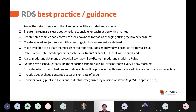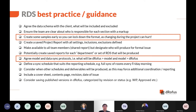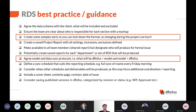We have collected a list of best practices for working on Room Data Sheets. We could spend 15 minutes on these slides, but we will send them in an email to everyone instead. We have three key takeaways: first, lock down the Room Data Sheet format early on in the project phase. Second, establish synchronization protocols and define the data flow between the geometric model and the database. Third, set out all your deliverables you may need on the project so you have time to do the necessary coordination.